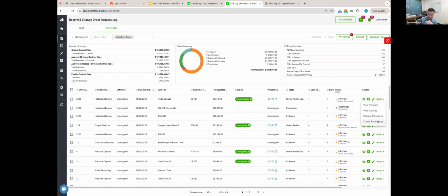And then Greg will show you quickly the back charge workflow where you can basically take one sub's change order request and back charge it to another. Yeah, we're somewhat uniquely positioned for back charges because you now have a live log with all of your trades. One of the biggest frustrations with back charges is trades will not acknowledge or put it on their log.